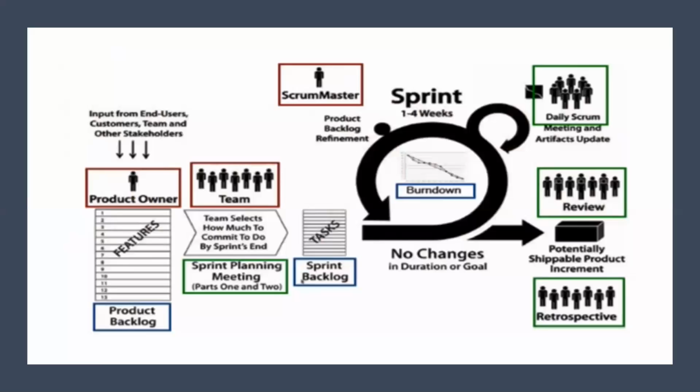Each day, the team has a stand-up meeting to update each other on progress and blocks, and to keep it fast. This is the burndown chart, where we keep all the project items, the sprint backlog items with the efforts. That way you will know how much time is available to deliver the items. The aim of drawing the chart is to know about the deliverables and the remaining hours. The burndown chart graphs the total hours left for the tasks.